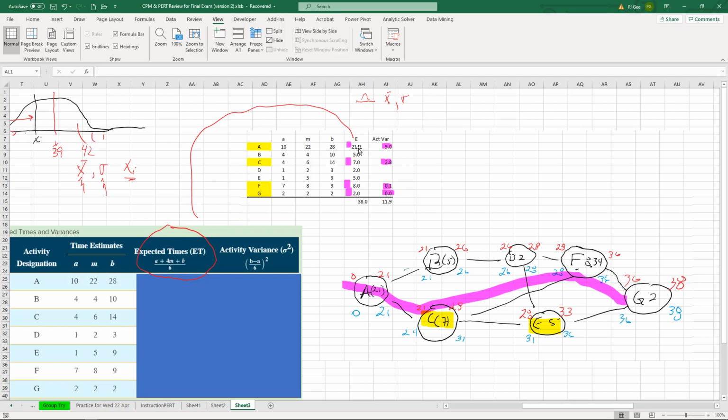So that's the network. That's the shape of the network right now, right? So now we're using these new computed numbers, right? We have 21 in here for A, B is 5, C is 7, D, and we go through there and we just plug the numbers and what do we run? We run early start, early finish analysis. That's across the top of this, right? Across the top of the circles, we have to figure out, especially when it bifurcates here, okay? It's actually when it condenses, okay?